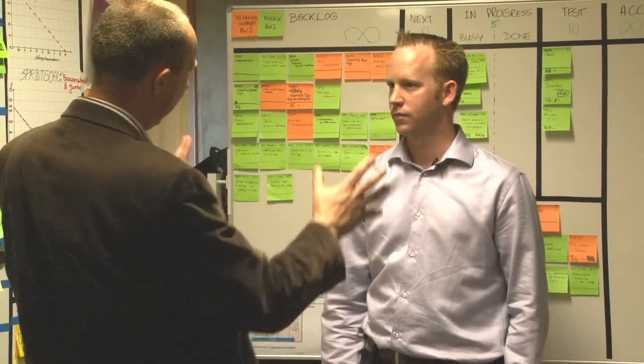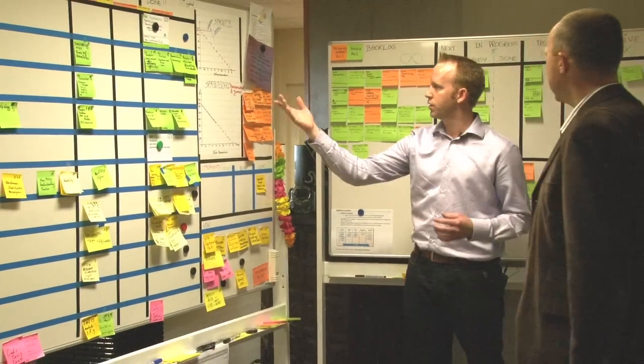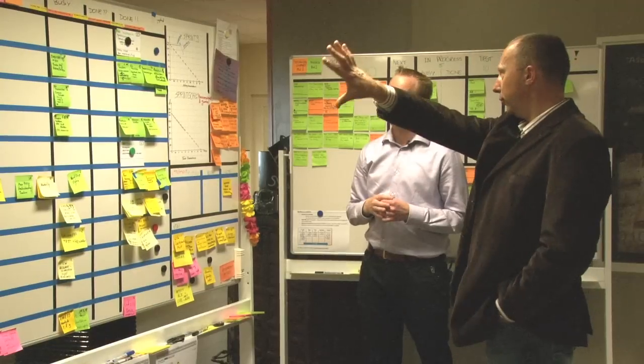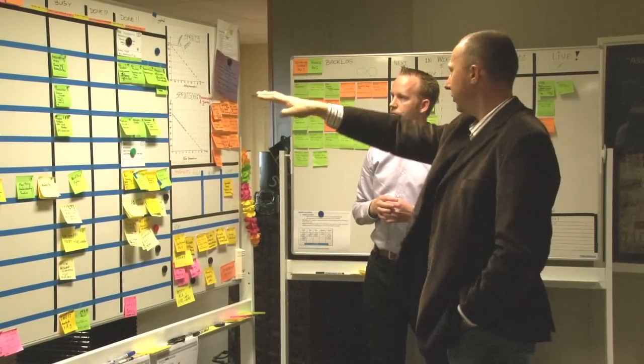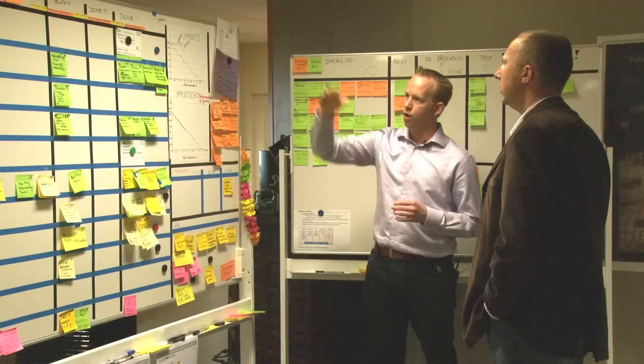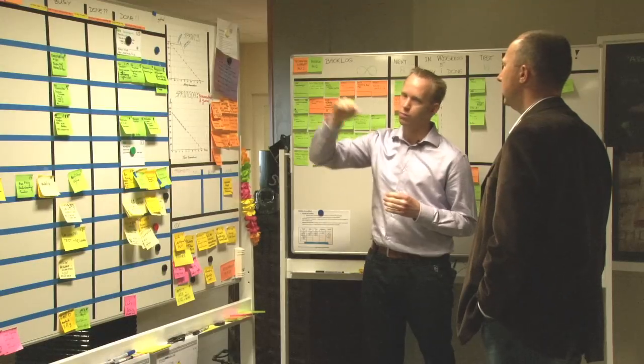A Scrum board and a KanBan board. Okay. Well, this is a classical Scrum board. I think you've seen many of these before. Yes. Yeah, stuff moving from to do, busy, done. Probably these are the stories. Yep, that's true. We have two products, green product, yellow product, prioritized by value. And we try to do the first story, the top story first.